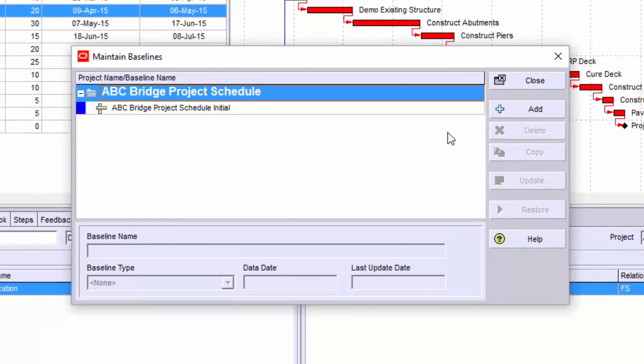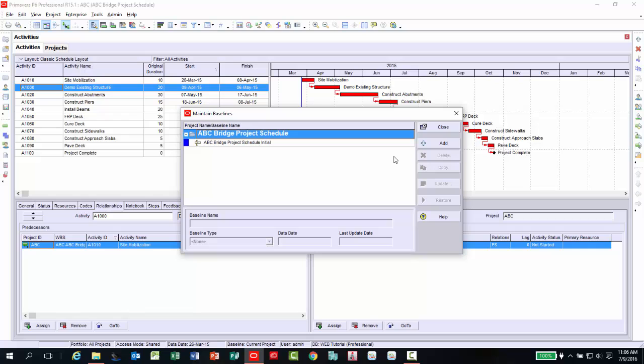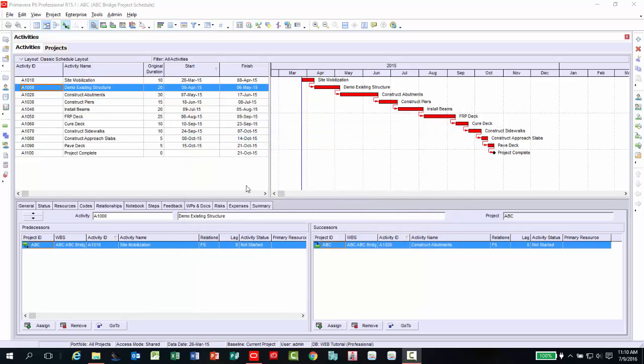At this point, the baseline has been maintained, or in other words, a copy of another schedule has been made available to this project. Now close the active window. Your last step in the process is to assign your baseline to the project.